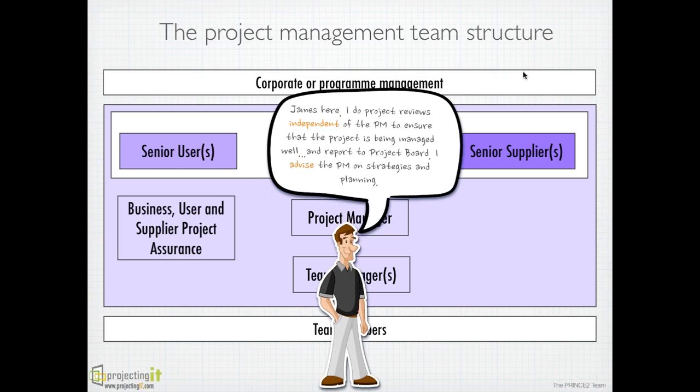The project assurance advises the project manager in using best practices, checking the reports, plans, and registers of the project manager. They also ensure the people who participate in quality reviews and quality activities have enough competency and the work as stated in the strategies is being complied with. You can call them whistleblowers or kind of watchdogs. Generally, they do project audits and they report to the board.